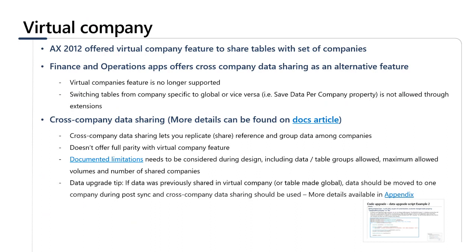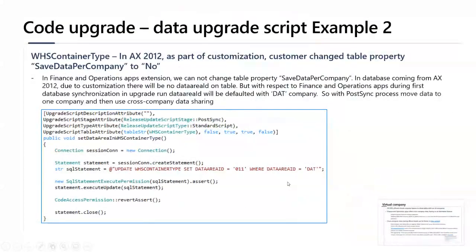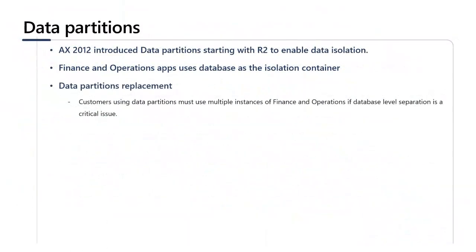If you are working with a customer who used virtual companies or made a company-specific table global, there is an important consideration from a data upgrade script perspective. You need to create a data upgrade script that moves the data into a specific company before configuring Cross-Company Data Sharing. A sample script is provided in the appendix of the slides. The fourth consideration is data partitions: in AX 2012 R2, data partitions were introduced to enable data isolation. In Finance and Operations, the database itself serves as the isolation container. Data partitions are no longer available. If database-level separation was critical, consider using multiple instances of Finance and Operations — think of each partition as a separate instance.